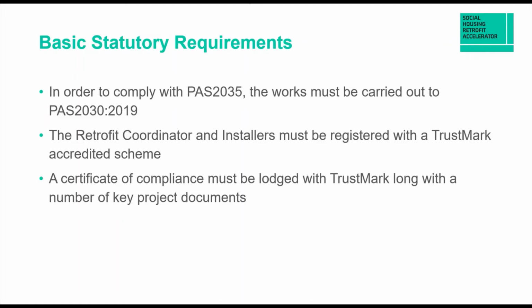And then we need to be issuing certificates of compliance with Trustmark as the retrofit coordinator, along with a number of key project documents. So the PAS 2030 installer will have their own set of documents that they are going to need to put on file with Trustmark. So that's going to be their assessments, what exactly they installed, the process they went through, key pictures of what they did. So they have their own process they need to lodge with Trustmark. As a retrofit coordinator under PAS 2035, we have a separate one we need to lodge with Trustmark.